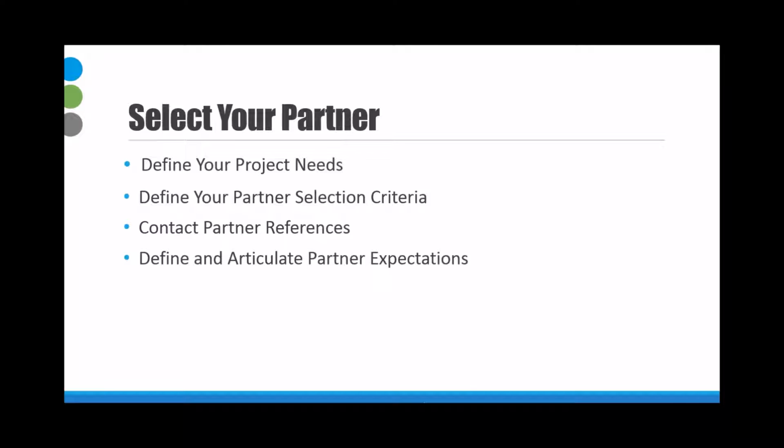You also want to ask, what is the size of the firm? What will your availability be to the project team and developer resources? How does that align with your timeline and when you want to get things done? How many CRM projects have they completed? What are the project fees and timelines? I mean, those are typical evaluation points in any type of project. But specific to CRM, you'll also want to ask, how comfortable are they with, or what's their philosophy more of using out-of-the-box CRM functionality versus doing custom development work? And how does that align with your goals?